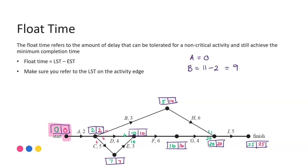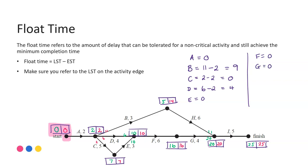Activity C: latest start time of 2, earliest start time of 2 - it's a critical activity with a float time of zero. Activity D: latest start time 6, earliest start time 2, so a float time of four. Activity E: float time of zero. Activity F: float time of zero. Activity G: float time of zero. Activity H: latest start time 14 minus earliest start time 5, so float time of nine. Activity I: float time of zero. Remember that any activity on the critical path should have a float time of zero.